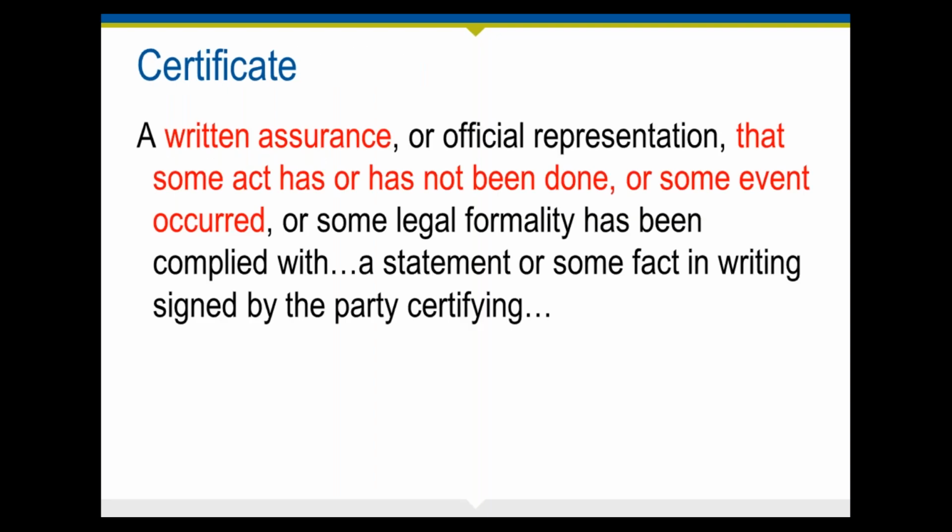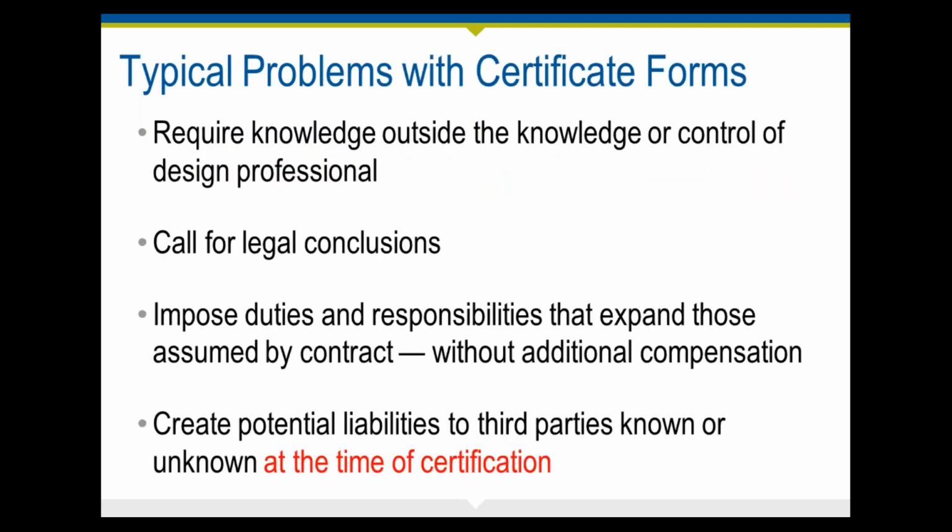So a certificate really is a written assurance that some act has or has not been done, or some event occurred. So it's a statement of some fact in writing signed by the party certifying to that. So whenever somebody gives you a certificate and says, okay, sign off on it, there may be challenges to that because you didn't draft it. So it may call on you to assume required knowledge that is outside your knowledge or control based on the scope of services that you've provided.